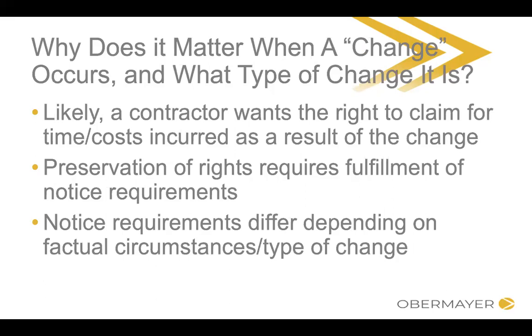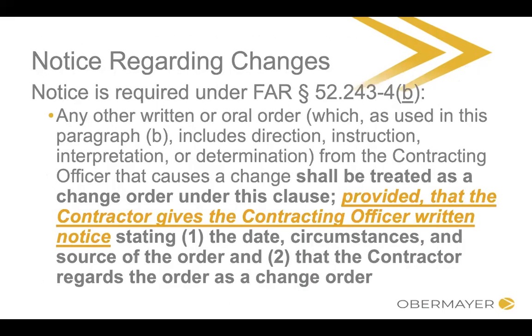If you want to get those additional days and dollars, if you want to be able to request an equitable adjustment or request a mod, or ultimately if you have to file a claim, you're going to need to show that you fulfilled your notice requirements. And the notice requirements differ depending on whether you're dealing with an express change or a constructive change. So when you are dealing with constructive changes, we're going to go back to the section of the clause dealing with constructive changes. That's B. Remember, it's up on the screen.